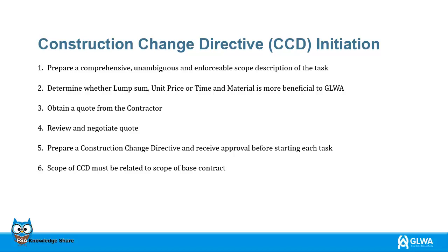5. Prepare a construction change directive and receive approval before starting each task. 6. Scope of CCD must be related to scope of base contract. It is recommended to avoid scope creep by adding non-related items to your project.